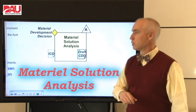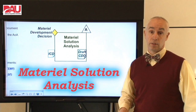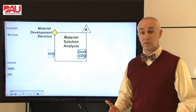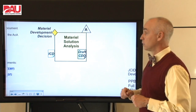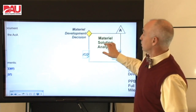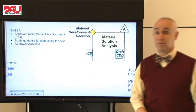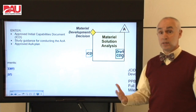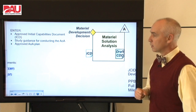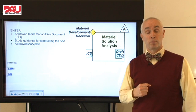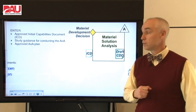Our first phase is Material Solution Analysis. We're kicking that off with an initial capabilities document — what the user provides — which says we have a warfighting capability that's missing in order to defend the nation. In addition to the initial capabilities document, in order to enter this phase we've got to have a plan and guidance for how we're going to do our analysis to pick the best technology — that Analysis of Alternatives. We also have to have an approved plan for how that AOA is going to be done and who's actually going to do it.